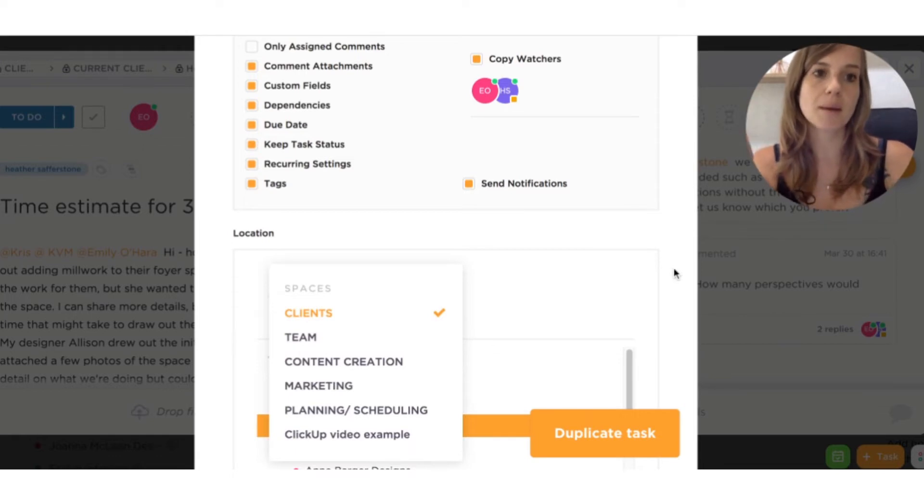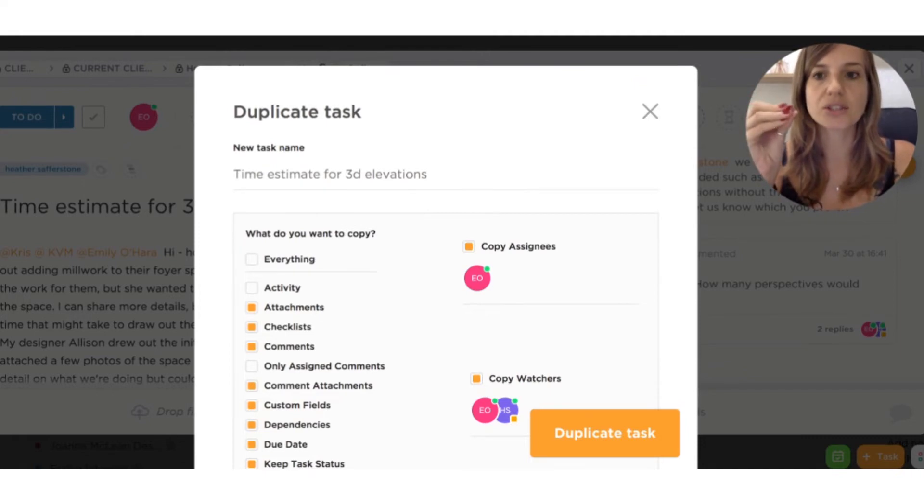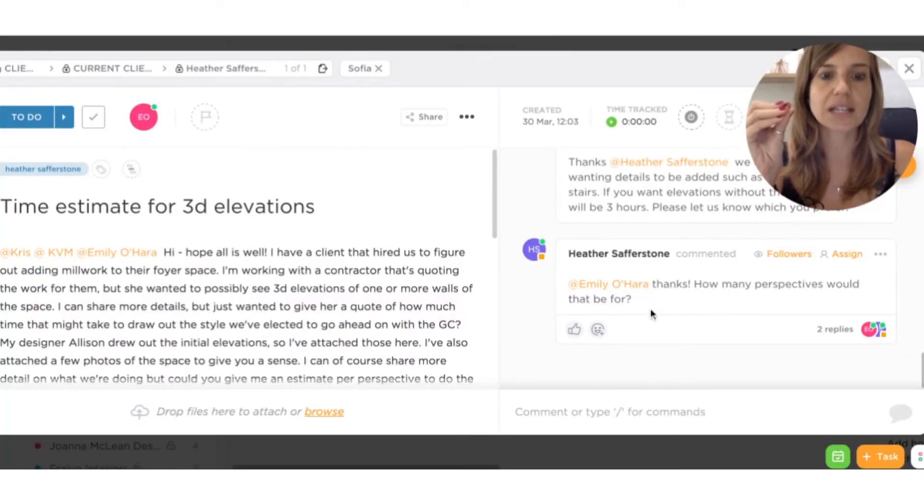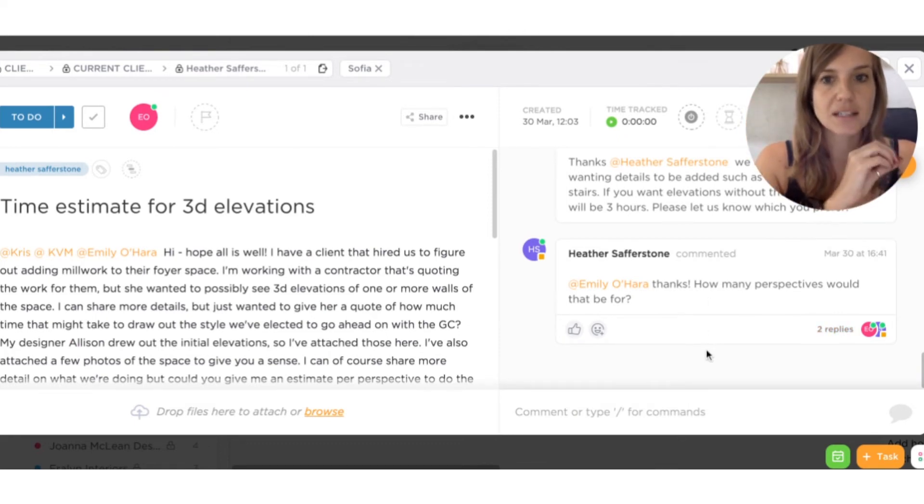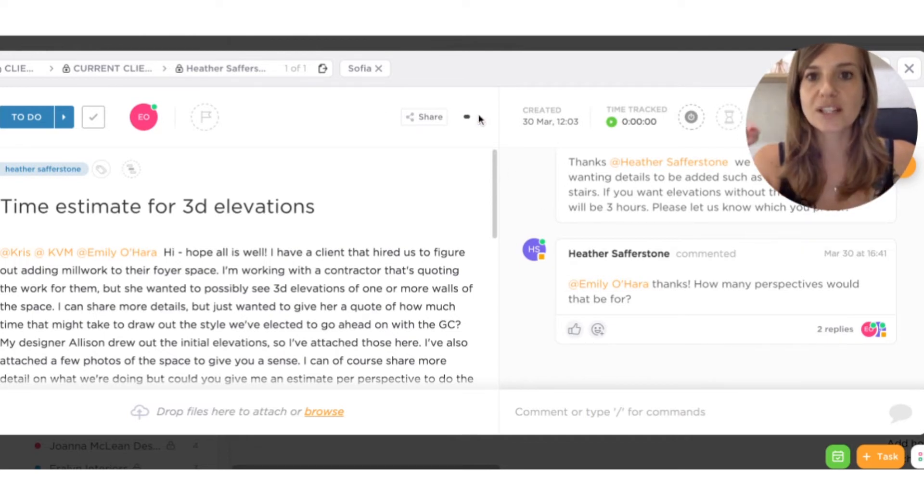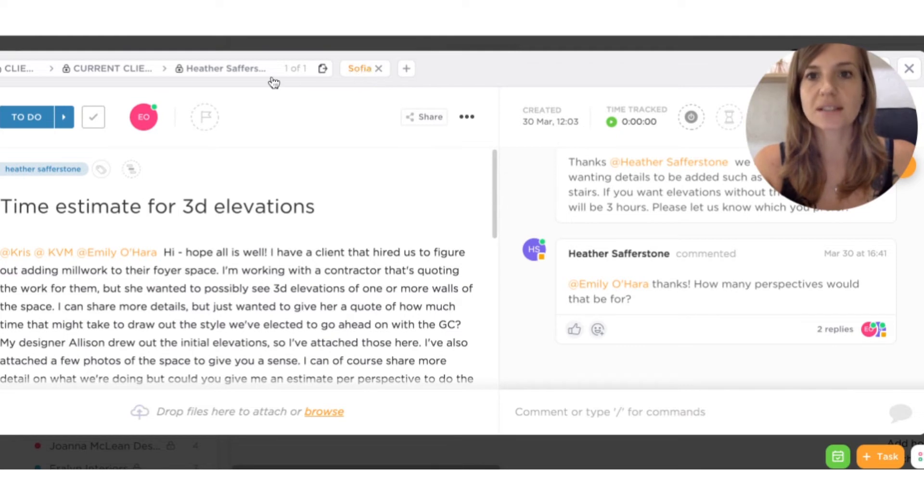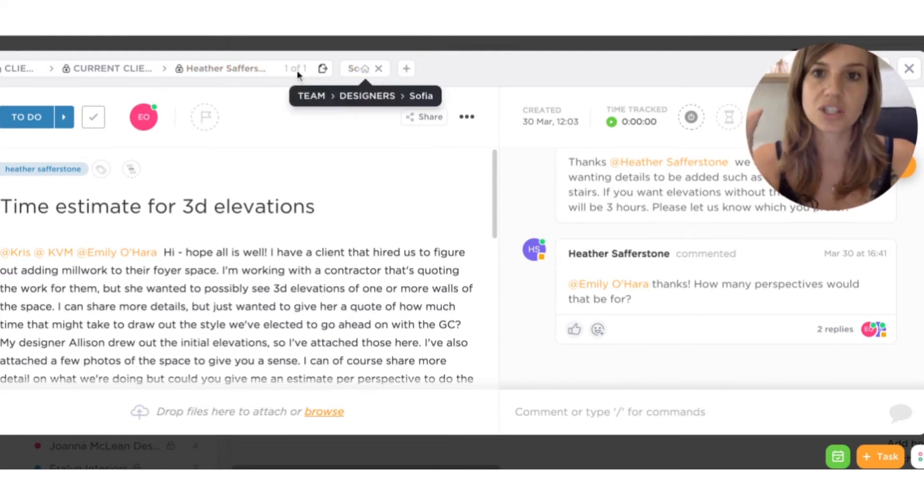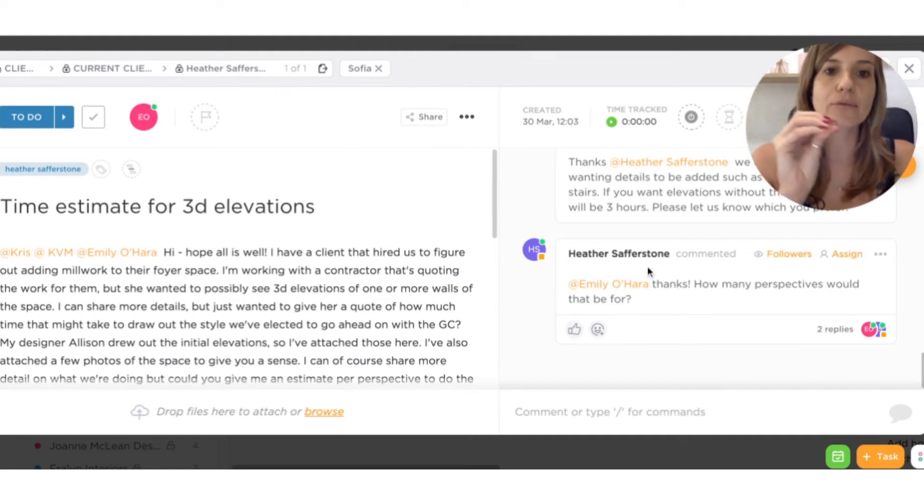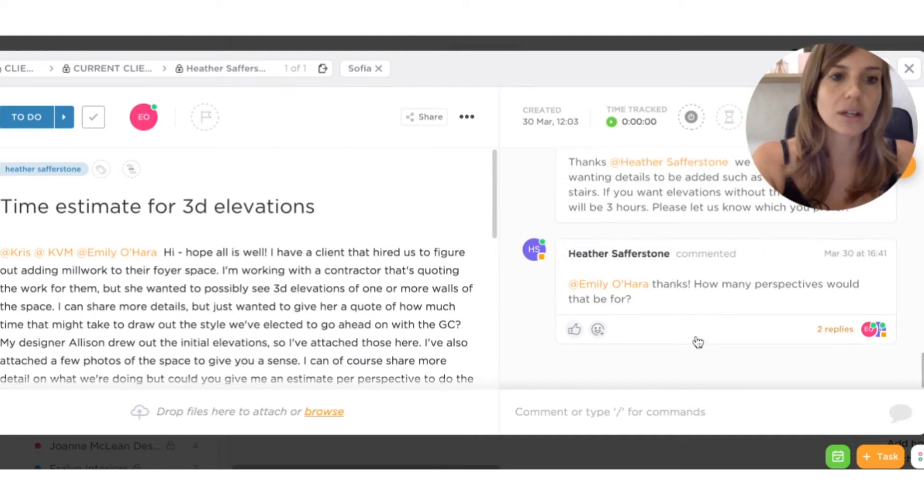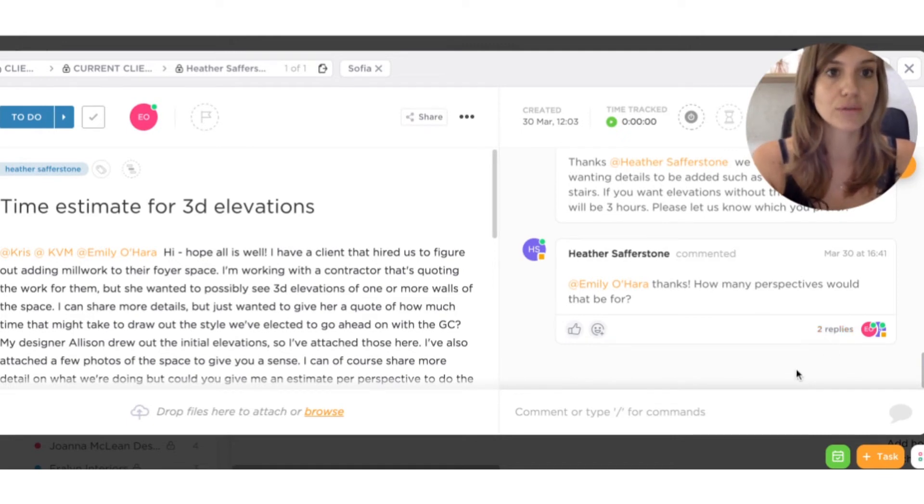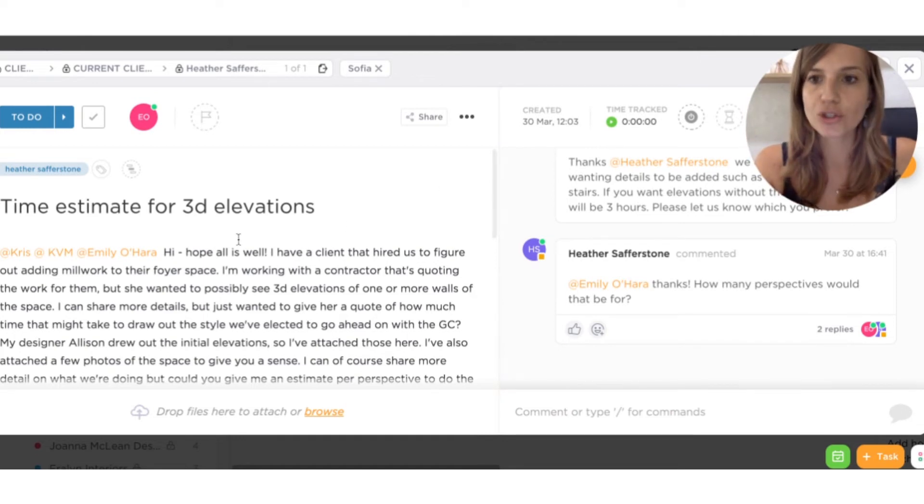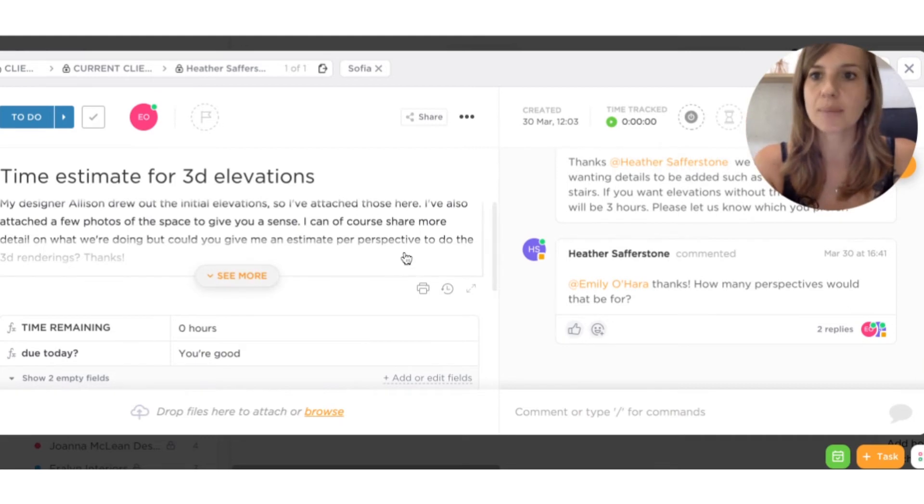You would be able to change to space, to team, and then choose the team member that you want to share that task with, so they can do the work. I used to do that. And the reason why it's not good is because every time the client adds a comment about the work, so she gives feedback, then we have to manually add that feedback into the designer's cards. So the way that we've been doing it, as you can see here, you can add to other lists, add tasks to another list. So Sophia got the project and she's basically sharing the same card as the client. So it means that every time Heather sends a comment on the card, Sophia would get the comment and she would be able to do the changes based on the newest comment. She doesn't have to wait for us to send her feedback. She can also see any additional attachments added to the card. She sees everything that's happening. So that's why it's very important.